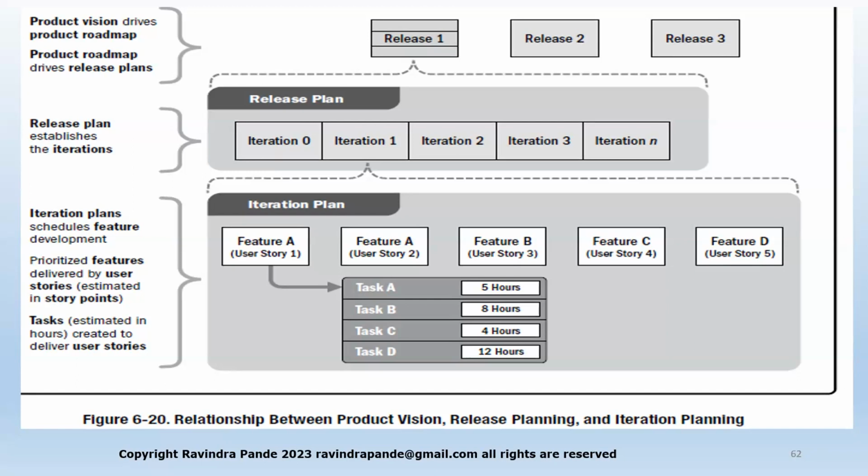So please just try to understand how this bifurcation is happening at a planning level. And we normally have something like feature 1 development as a subtask, iteration 1 as a group task, and on top of that, release 1 can be another group task, which you can label as phase 1, phase 2, phase 3 as well.